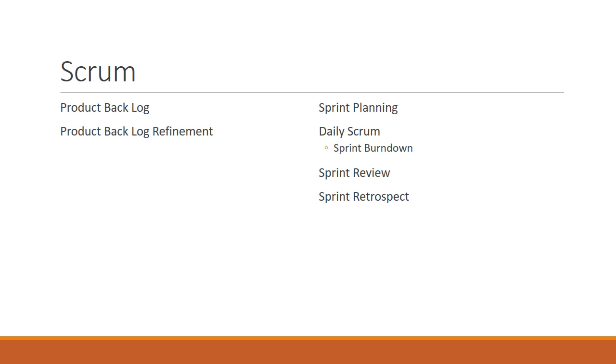Now, if it's an emergency that has to happen, the product owner does have the ability to stop the sprint and tell the team, let's come to a stopping point right now, and we need to work on this backlog item. This takes priority. But only the product owner has the ability to do that. Nobody else from his team, or management from the functional areas of the Scrum team members, can do anything like that. It's only the product owner.